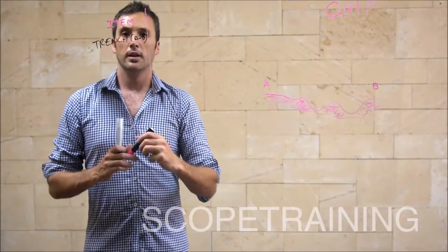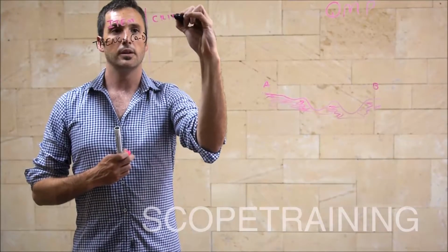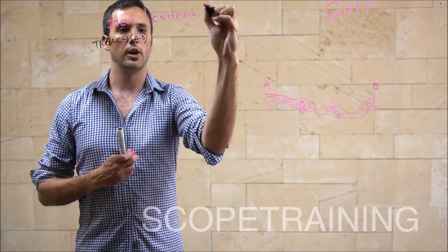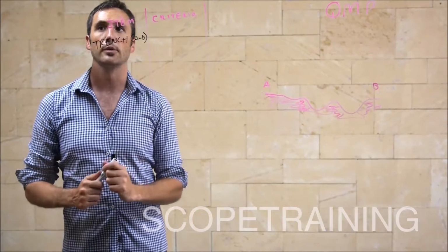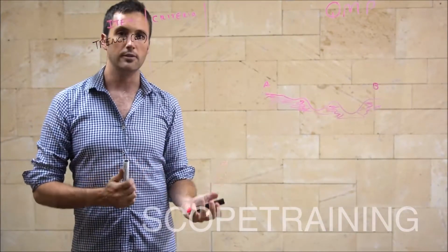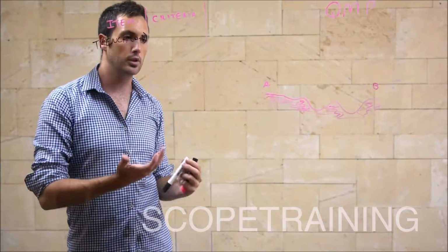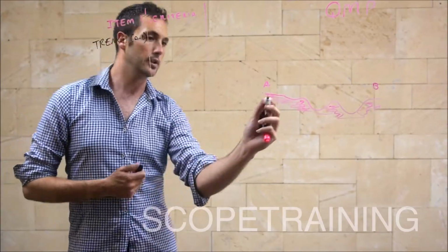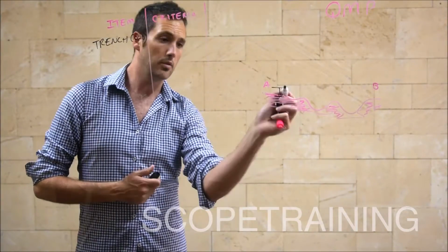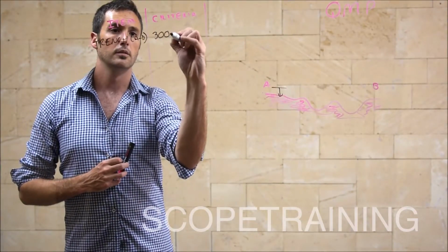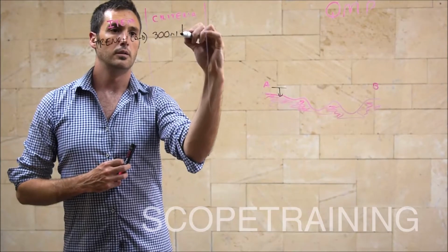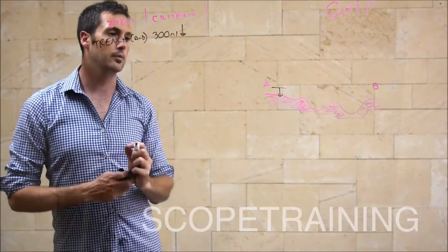Right? Now, what criteria am I going to use to identify whether this has actually met my requirements? And this would be my quality criteria. If there's a standard, that's what we would use there. We would look at the applicable standard. So if it needs to be 300 mil underground, that's what we would use, a standard. 300 mil below ground level.